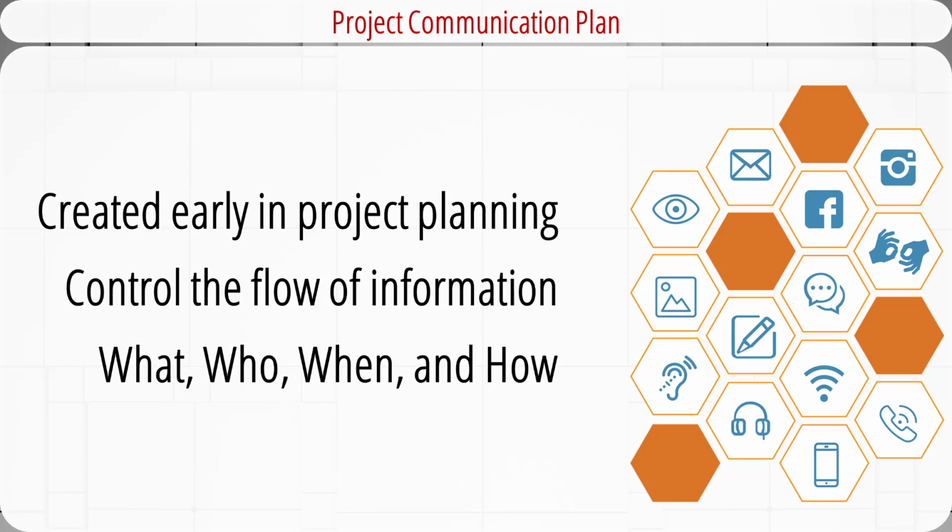When creating the communication plan, we need to answer the following questions. What information needs to be collected and when? Who will receive the information? What methods will be used to gather and store the information? What are the limits? Who has access to certain kinds of information? When will the information be communicated? How will it be communicated?